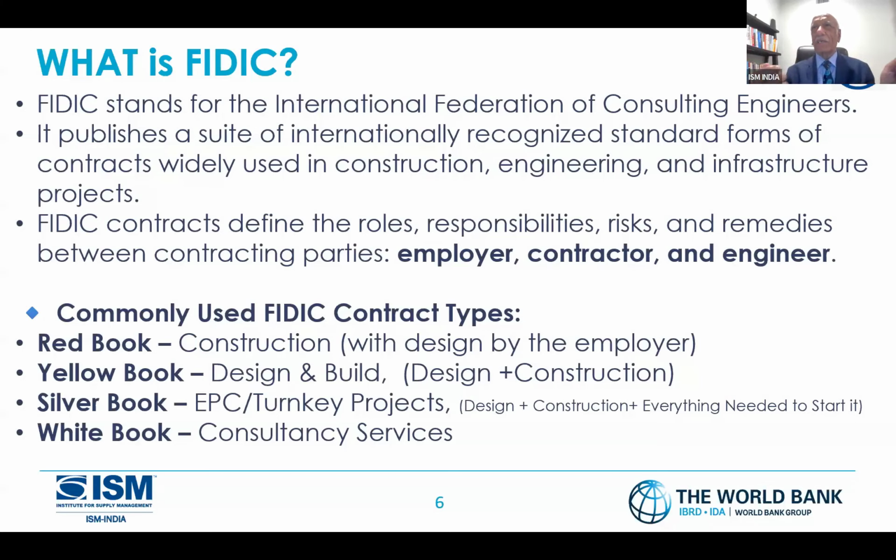But the Silver Book is a turnkey. The name turnkey means you will do the complete thing and give me the key. I turn the key and the plant works, the hospital works, the school works. Those are the turnkey projects, which we also call EPC type. The White Book is another common book for consulting services. If you're doing a big consulting work of $4 million, $5 million, then yes, I'll go with the White Book.